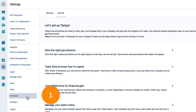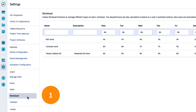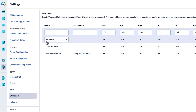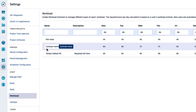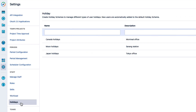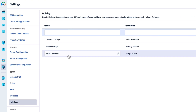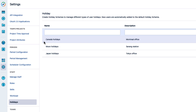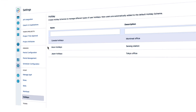Step 1: Make sure that your team members are in the correct workload scheme and the correct holiday scheme. The workload scheme minus the holiday scheme equals the capacity for team members to work.